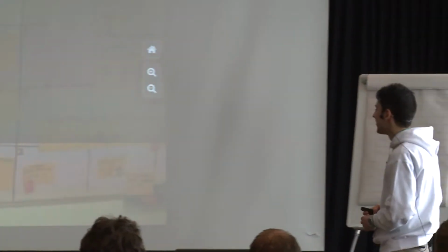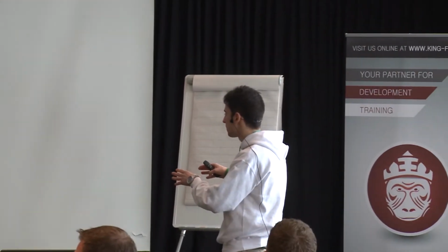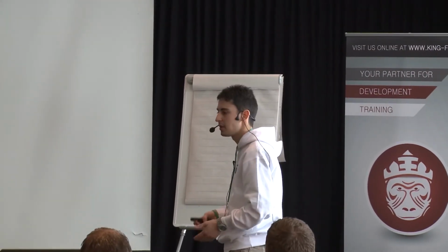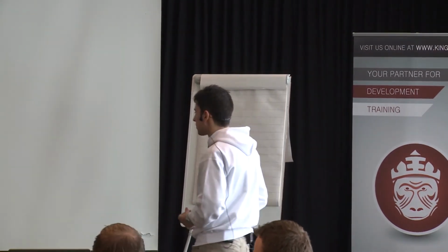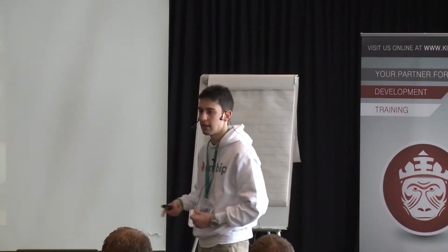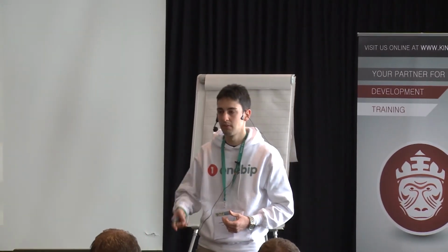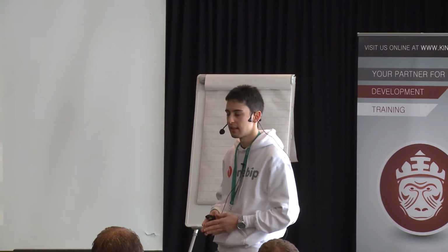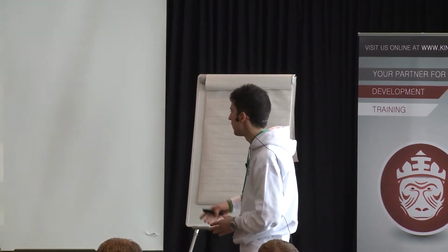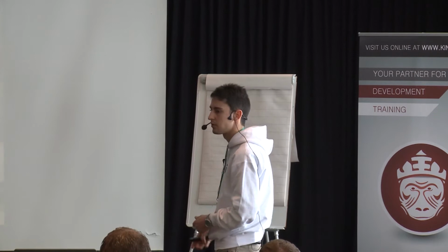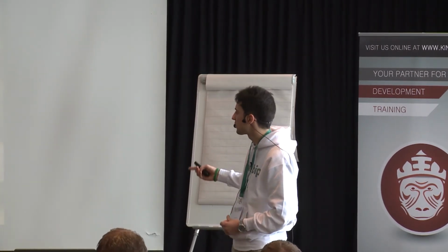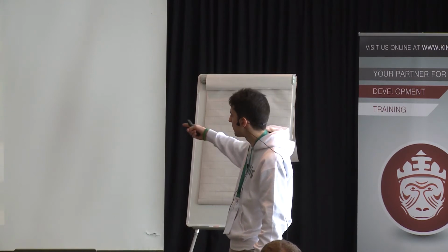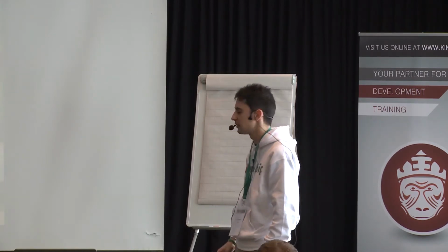Actually, it is not a real room, but just a swim lane. And we put people in it by rotation, so each week the people working in ER change. These members of the team are responsible for dealing with any emergency that comes from the live website or from something external to the team. The other swim lanes are dedicated to the current features in development, so that the Pomodoros and the stories that the rest of the team is working on are not interrupted.